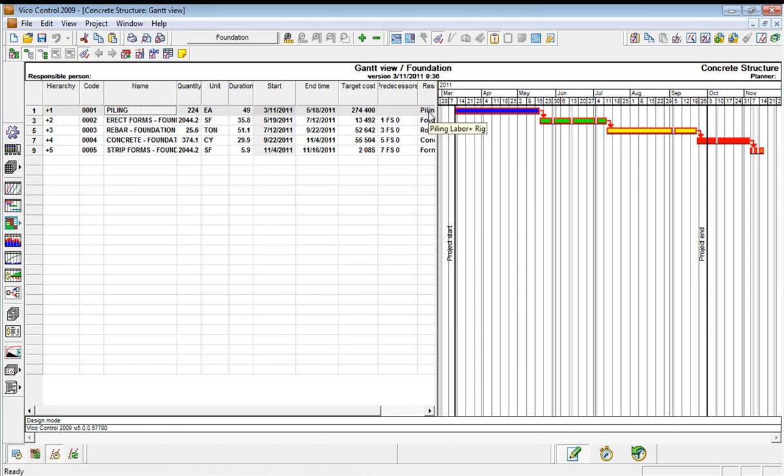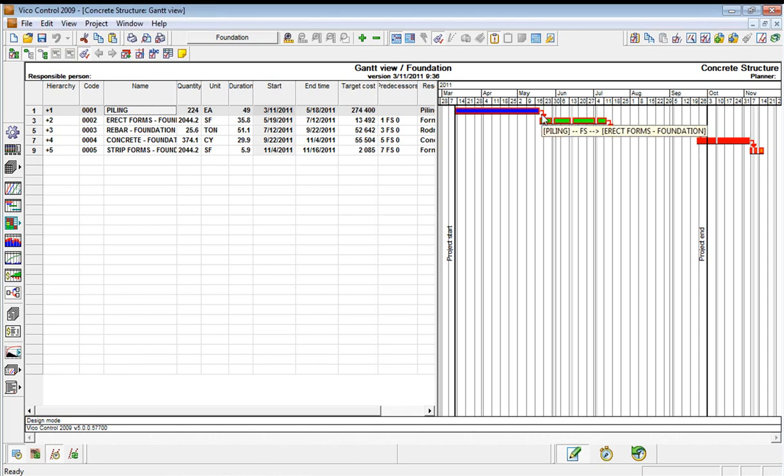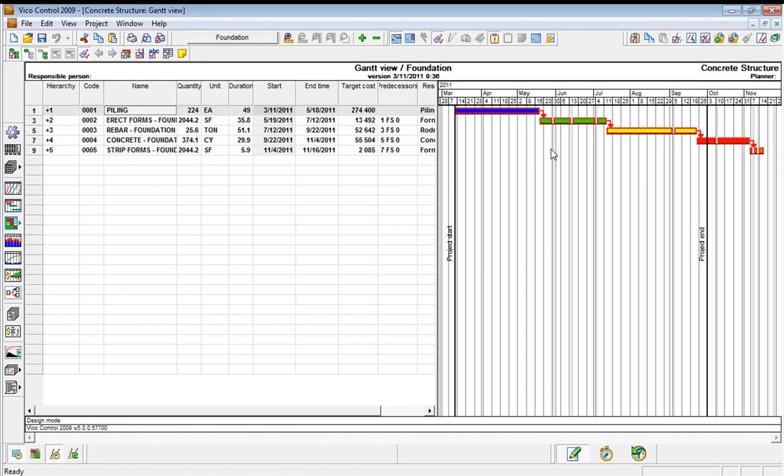At the moment, this isn't a location-based schedule, and we would have to make many assumptions about when to start the formwork for the foundations based on a negative lag, potentially on the dependency between the piling finishing and the foundation starting.